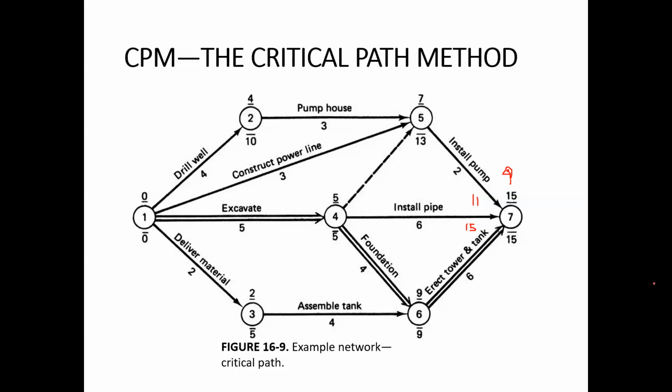Okay. So with this, we can see that there are certain activities which we can identify as the critical activity. So excavate is the critical activity, because you can see that it is connected by 2 events which are critical.